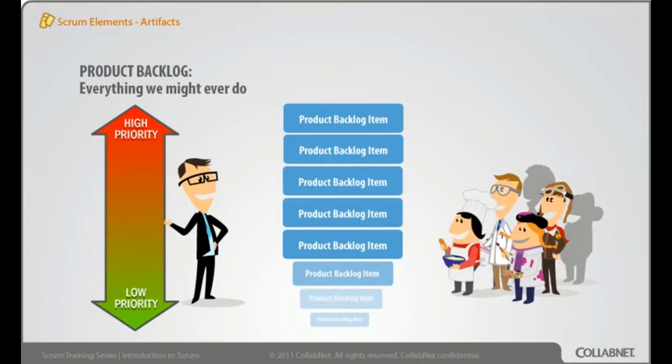Anyone can add items to the product backlog, but the product owner has got to prioritize them, and the Scrum Master has got to make it visible. A well-formed product backlog does not contain tasks, only well-formed product backlog items, or PBIs, which might be written in user story form or maybe use case scenarios. Force ranked means there's only one thing in the top position. Getting organizations to do this is usually a breakthrough.